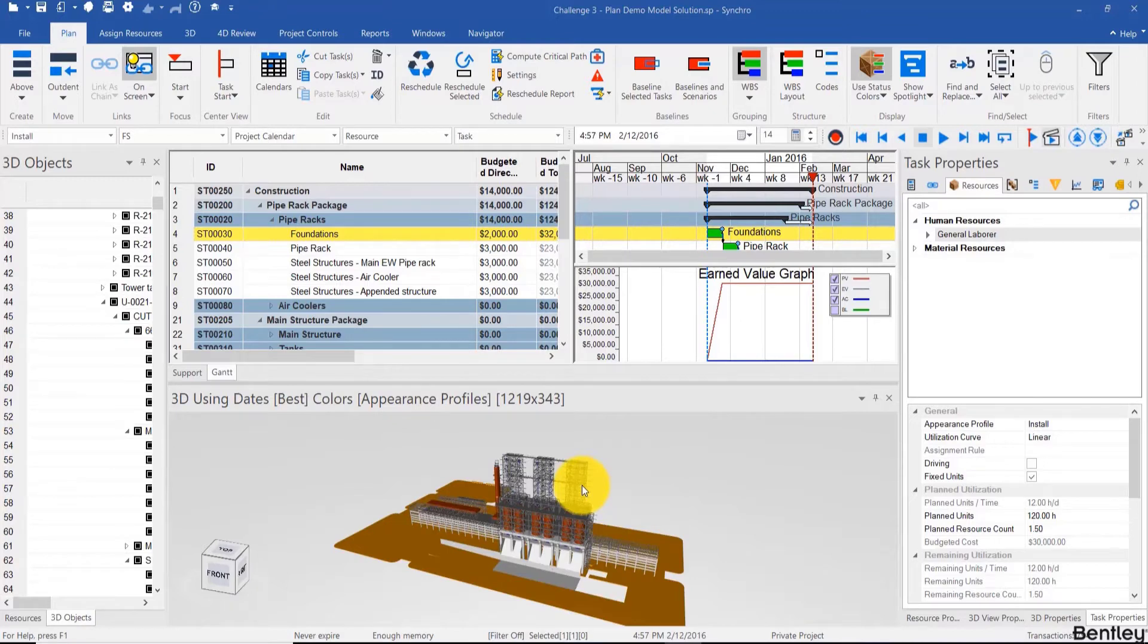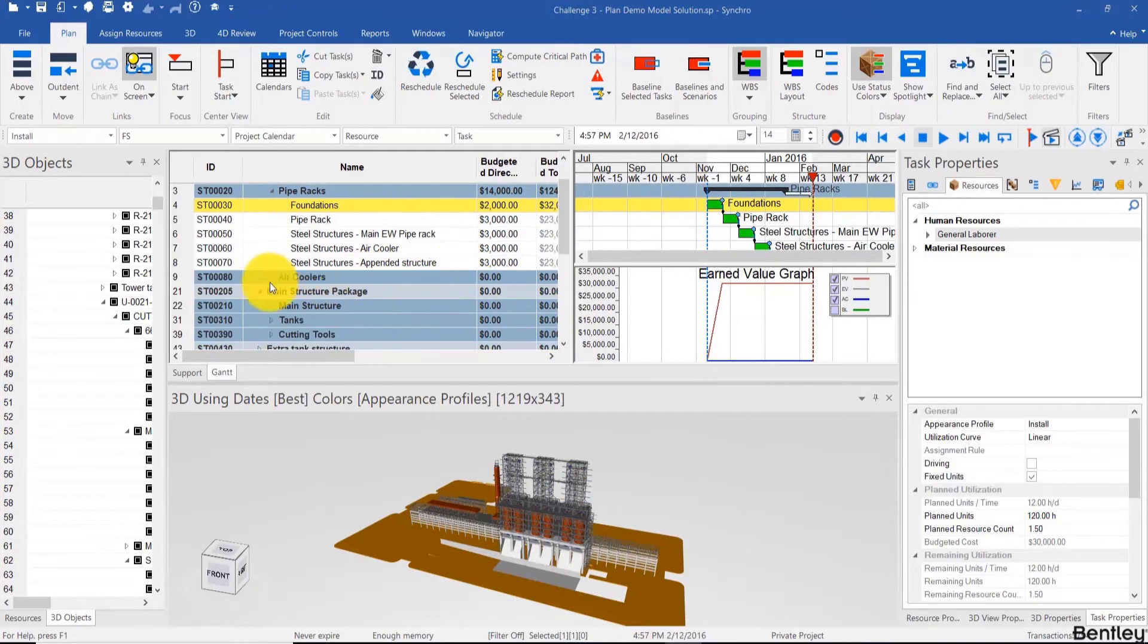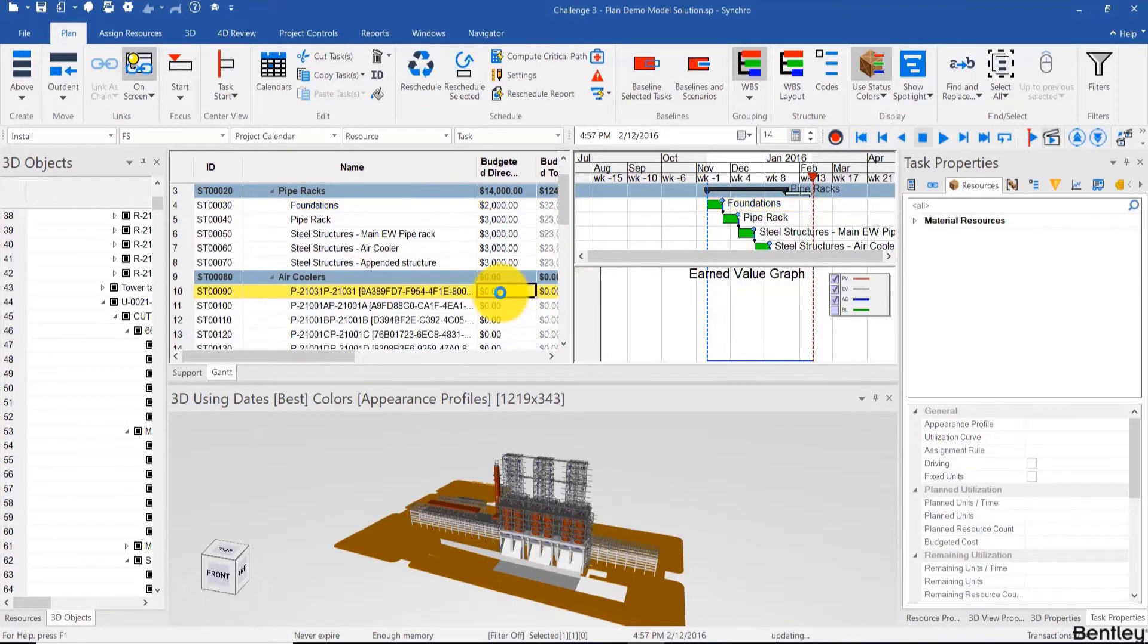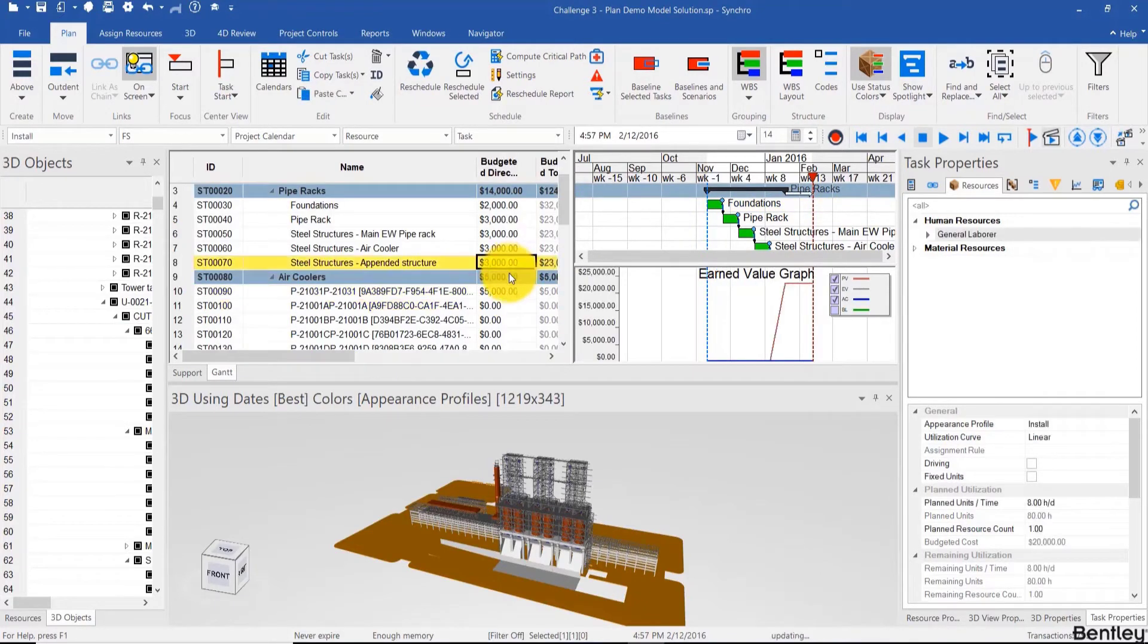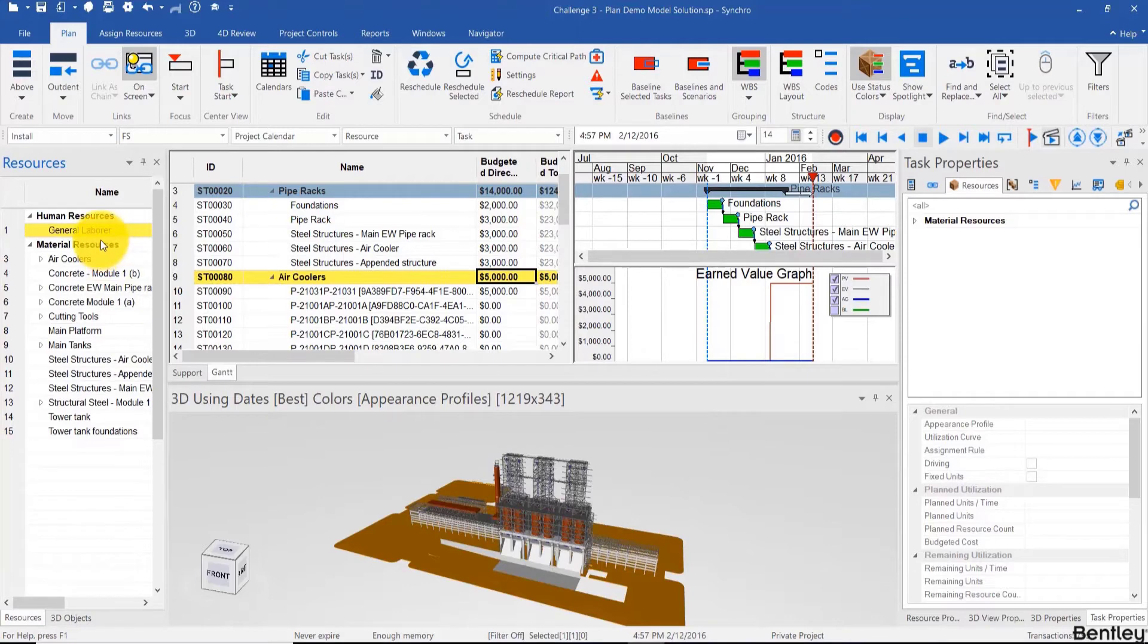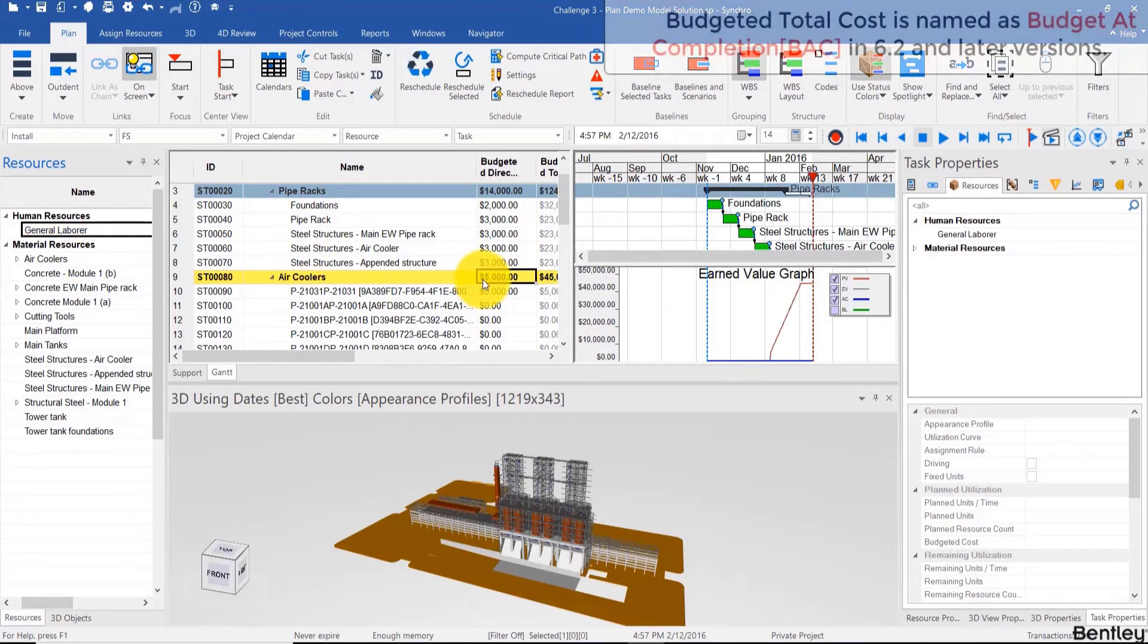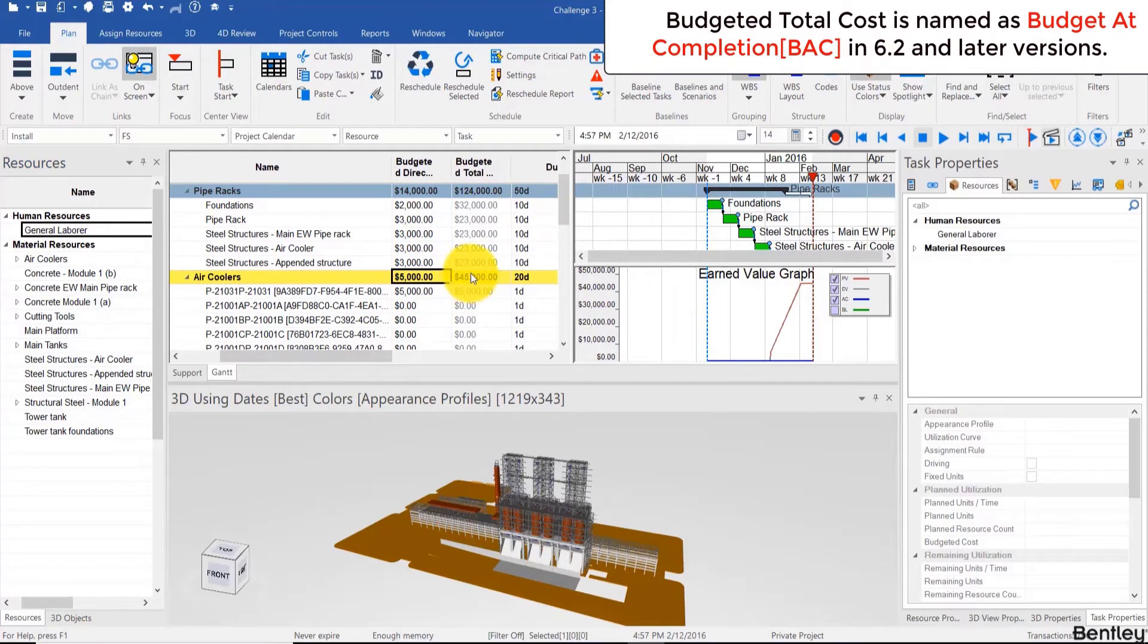In order to do that, we want to add some more costs than we did in the previous video, so I'll just add a bunch of other activity costs. Now you can't really add something directly to the parent, but you can add a resource to a parent. For example, the laborer here, and even though air coolers is $5,000, the budgeted total cost is $45.